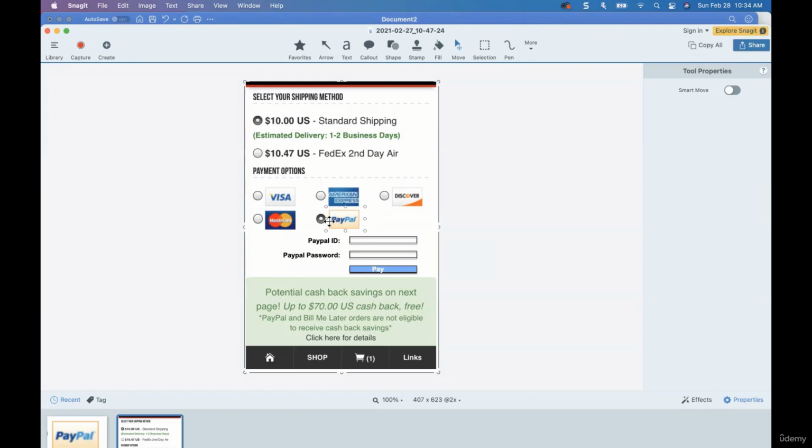So your assumption is we'll always receive a response from PayPal every time we make a call to PayPal. Or your dependency is this functionality is dependent on receiving a confirmation from PayPal of valid or invalid login. Are we all following this? So that's your assumption, your dependency for this project. So you want to list out what are some things on which this project is dependent. For example, and that's not in our control.